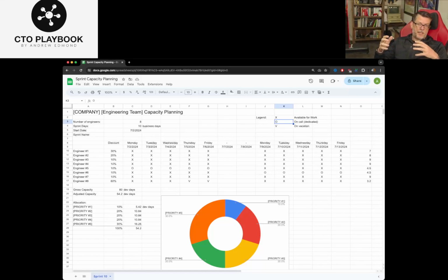I find most companies have enough operational load or operational burden and/or technical debt that it's super helpful to have one person separate themselves every 8 weeks for an 8-person team, or every 6 weeks for a 6-person team, to focus on operational excellence, technical debt, key infrastructure improvements, stuff like lowering latency and improving CI/CD tools. They're basically doing work from the engineering backlog. And we're going to talk more about backlogs and backlog management in a future talk, including operational excellence. So stay tuned for that talk coming up.